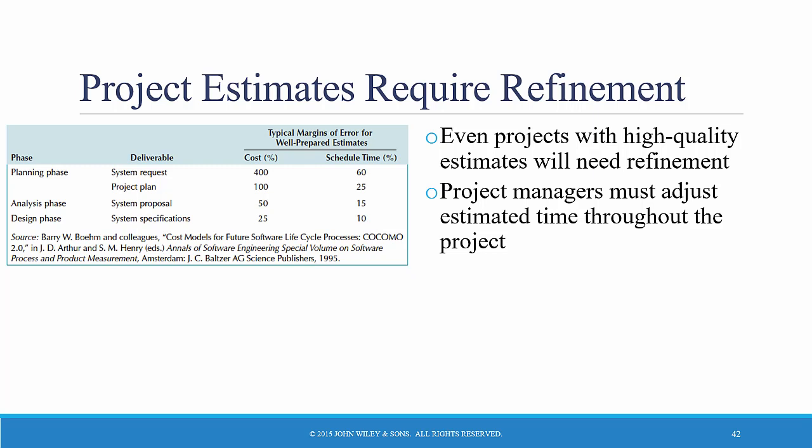As you complete each phase, or better yet, the steps within the phases, take a look back, see what your initial estimate was, and compare the actual progress in terms of cost and time spent, then revise the future estimates accordingly. Don't just assume you're going to catch up. If you have a cost overrun or time overrun early, don't assume you'll catch up — in fact, you won't. You should increase the cost and time estimates for the subsequent phases.